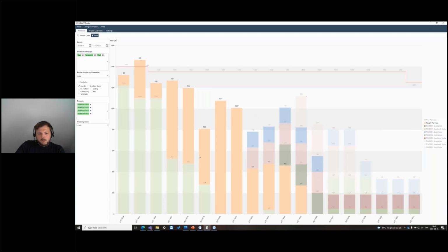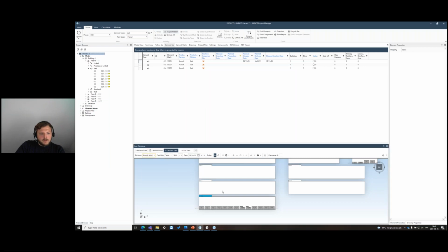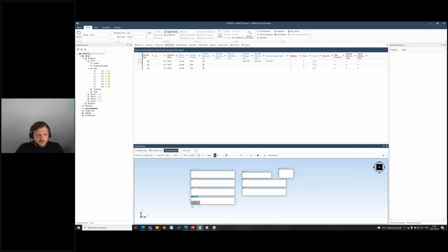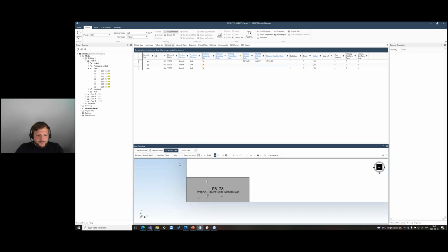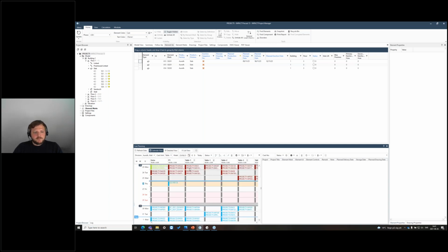Do you understand what I'm saying, Linus? Do you want to say something more here? Yeah, it's based on element. An element is an entity, and then we schedule per element. An element has a square meter, an element has a volume, an area, and then all the elements combined make up the maximum area that we produce every week, every month, and so on.